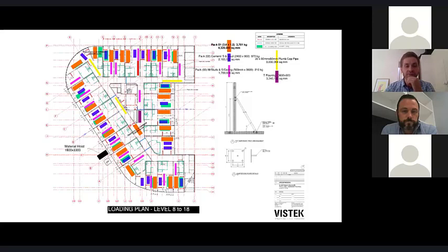Sure, I'm sure some have done some temp engineering, but actually setting out the props and locating them, and this was also done in 3D, by the way, with lots of meetings around sequencing and loading all of these material packs and the propping of the panels.